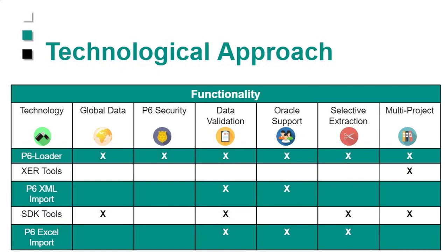Now, we had a client where someone made a mistake in manipulating an XER and they tried to make an EPS code into a global code and they spelt the word global incorrectly. Somebody just fat fingered it. Well, it imported fine, but then whenever someone would try and log into the database, it would immediately crash because when P6 loads, it reads all of your activity code dictionaries. So it would read that dictionary, come across a value it didn't understand, and it would just shut down.